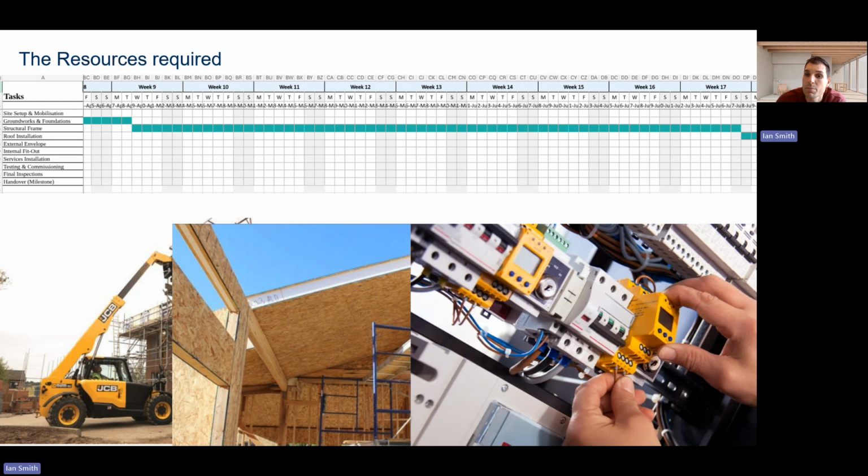But these are only required once the building is enclosed and the first fixed installation begins. They must operate within the internal work areas, coordinated by the floor area to prevent trade clashes and to prevent health and safety risks. This resource is clearly justified because service installation is essential before finishes and commissioning, and it directly affects the completion. Overall, when we align our labour, our plant and our materials within our construction stages of a Gantt chart and site locations, it ensures an efficient workflow and reduces handling and congestion and supports safe delivery of our project.